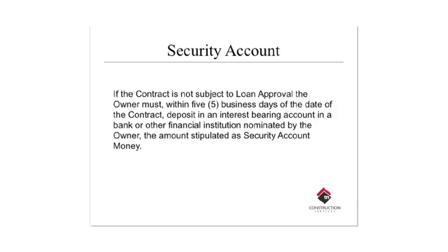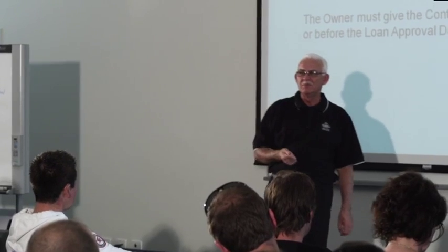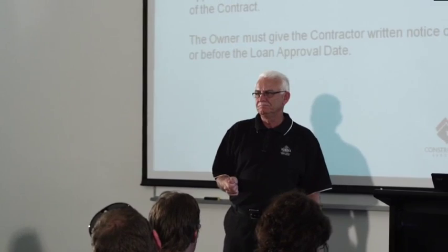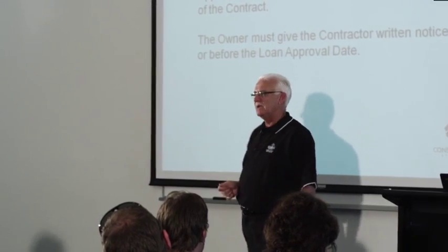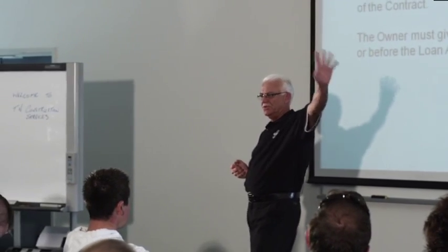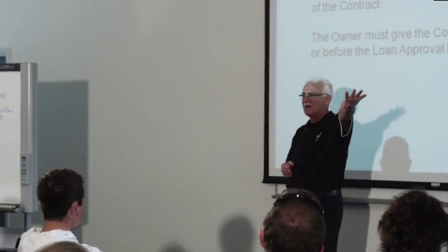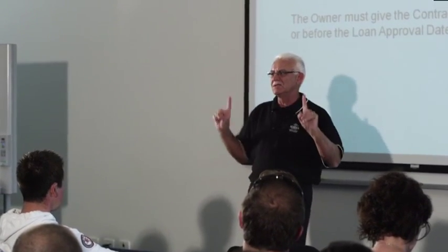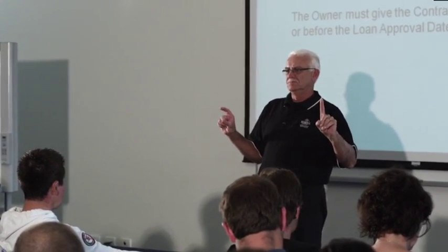If you want me to build you a house, Mr. Owner, for $1.5 million and you are going to pay me cash, we will open a joint account. We'll put the money in a trust account. You can earn the interest, I don't want the interest on it. It can be in your name, but withdrawal can only be by both our signatures.